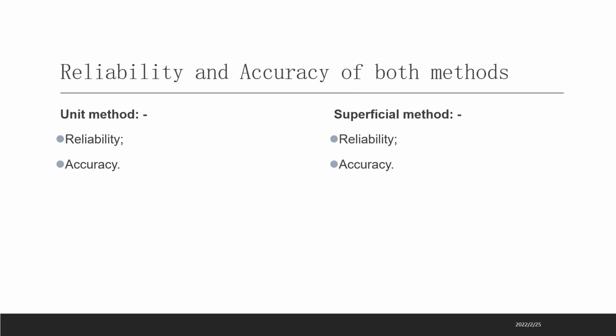The elemental cost analysis method tells a story about the construction project. We were also able to extract and utilize relevant cost data from the experience of our main contractor for use in this case study. As a result, we spent more time looking at the various parts of the elemental analysis, but it turns out more accurate than the superficial area method.